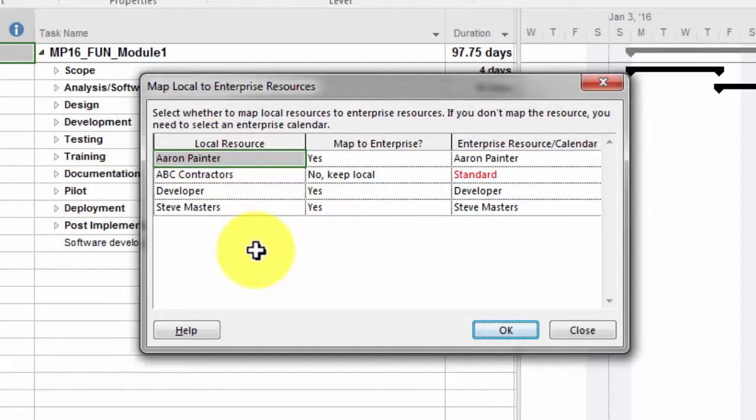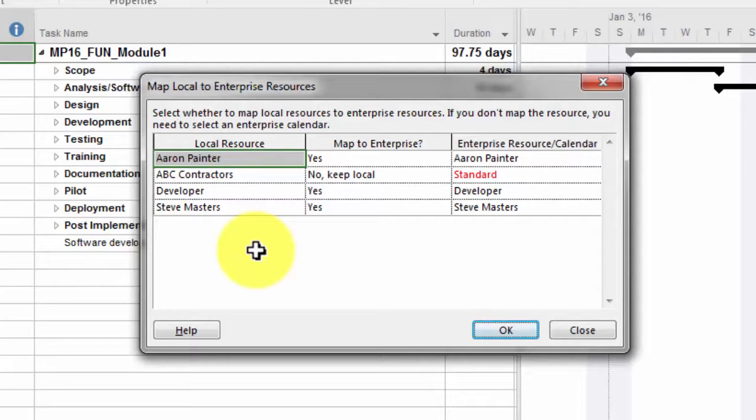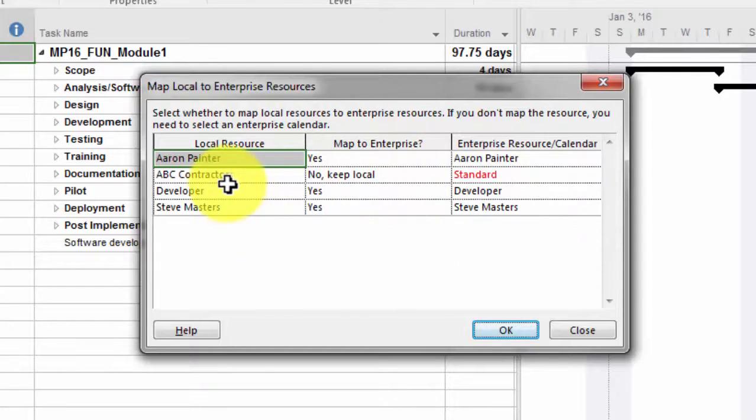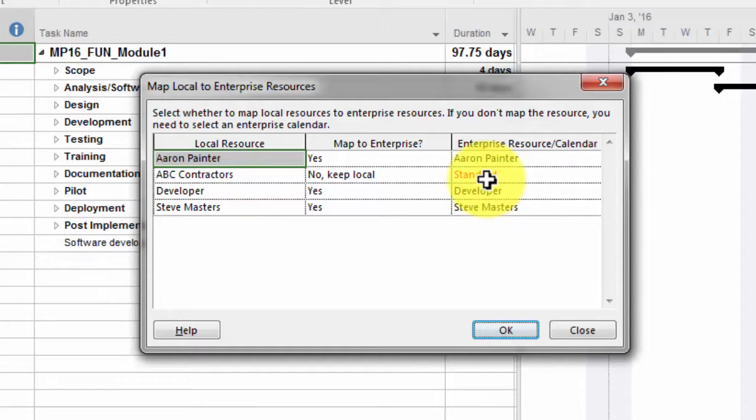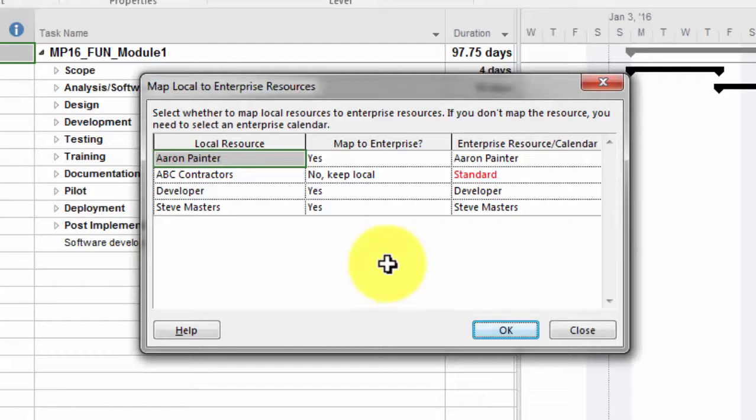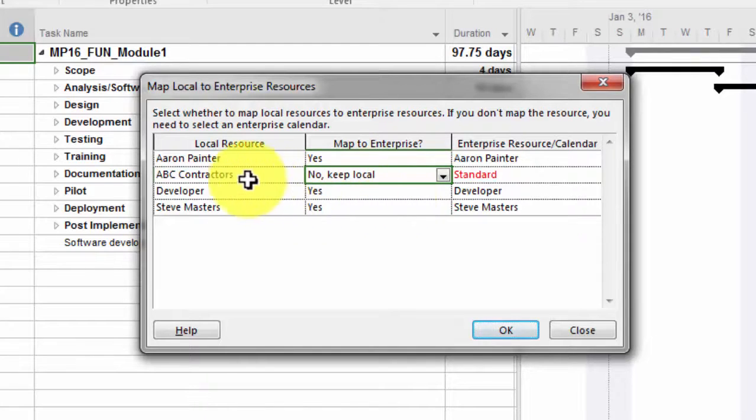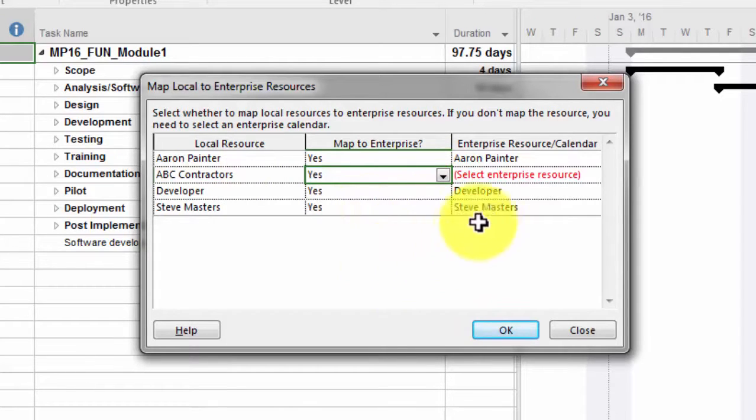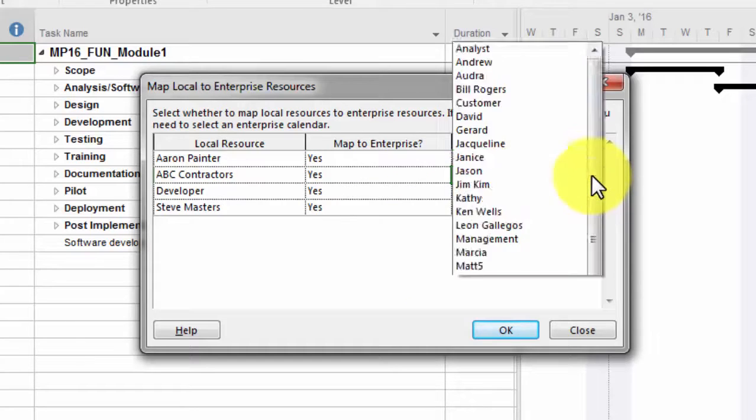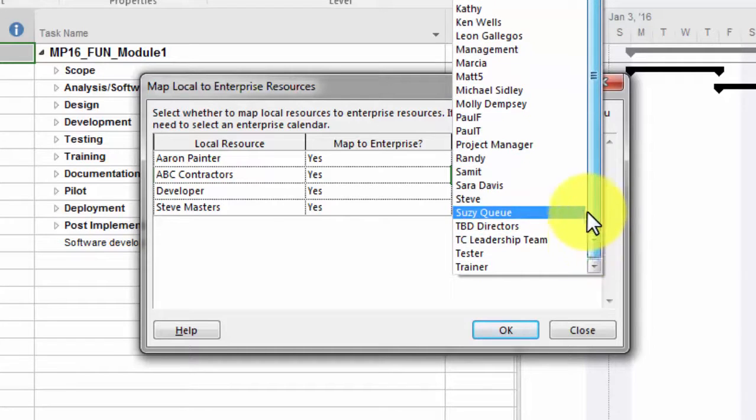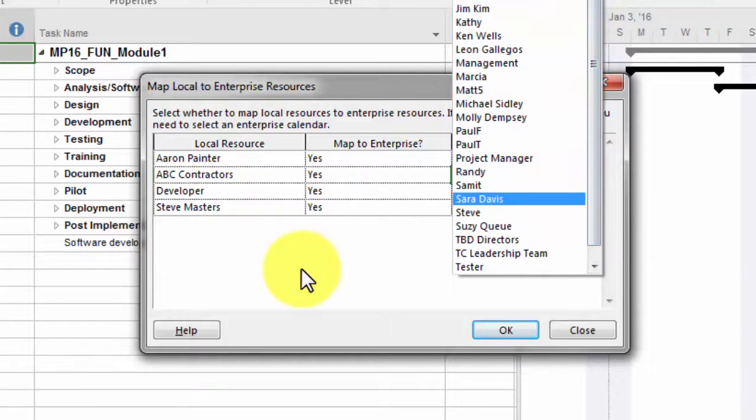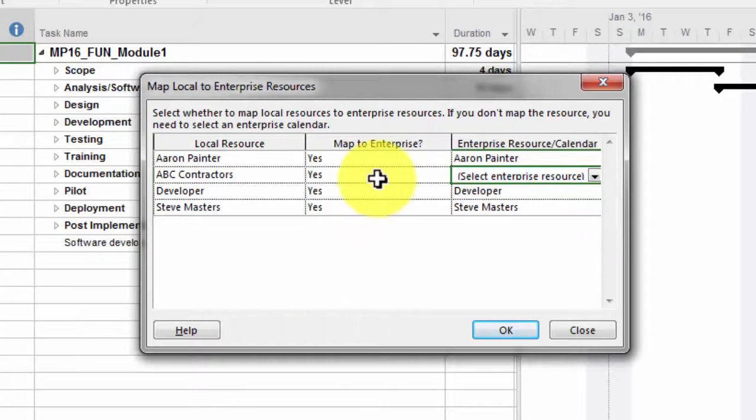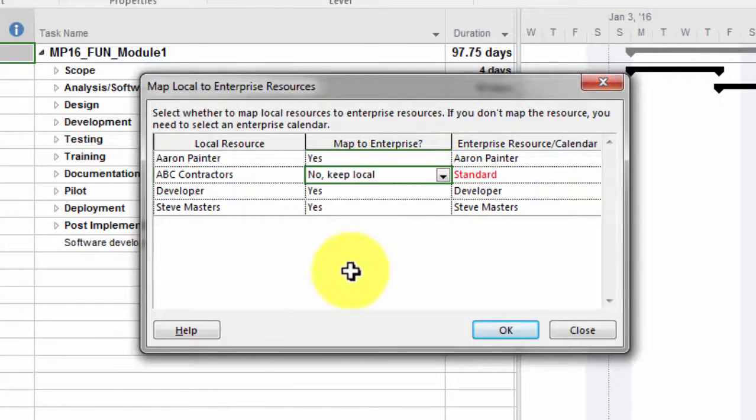One of the things that you can do when you are importing projects is, before you actually attempt to do the save, make sure that the names look the same in the enterprise resource pool as well as your local file. You can see that Aaron Painter is matching up nicely here with the enterprise resources. Also, the ABC Contractors—because it does not find that resource in the enterprise resource pool, you'll notice right here in the middle it says 'Map to Enterprise?' In other words, do you want to map this? Is there an opportunity to map it? So you still have that option. I'm going to tell it no because I do want to keep it as a local resource.